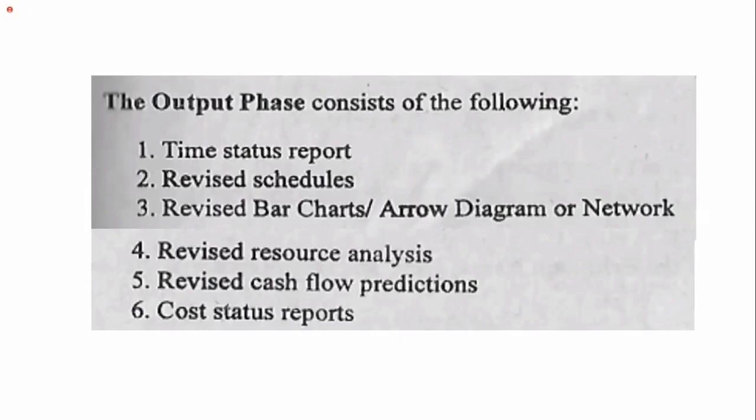The output phase consists of the following: time status reports, revised schedules, revised bar charts, revised resource analysis, revised cash flow, and cost status reports.